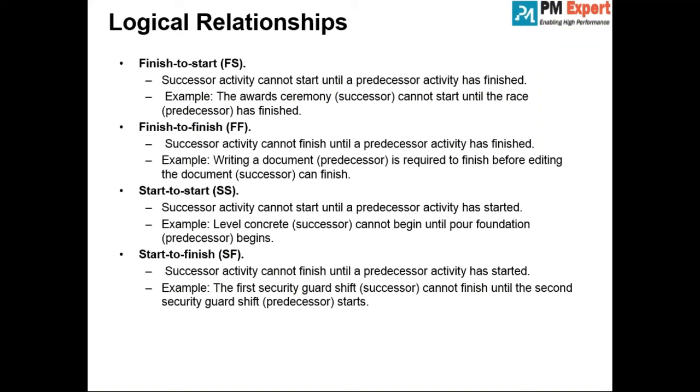For example, I will not keep on procuring licenses. I will see how many licenses have been consumed. Based on that, I will trigger procurement, based on the completion of successor. I'll give you a very layman example for it. Let's say you procure bricks and construct a wall. Now you don't keep on procuring the bricks. Based on how much wall has been constructed, you will trigger procurement. So this is start to finish.